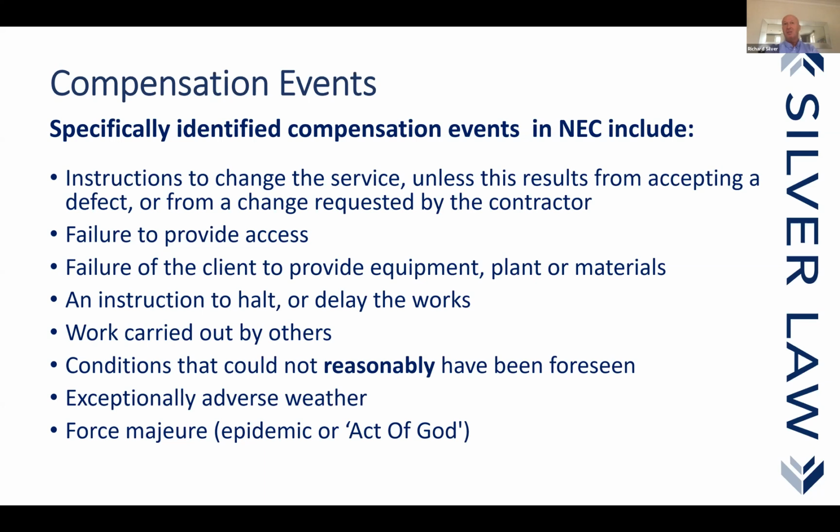Where we've got an activity schedule and the contractor wants to increase the number of items on the activity schedule, then that program must match that activity schedule. Now, just deal with that. On the activity schedule, the contractor is paid when those activities are completed. So if he has one activity, groundworks, he doesn't get paid anything until those groundworks are completed. That's obviously going to be no good. So he's got to break all the activities down, which means each time he breaks down an activity, he's got to produce a new program.